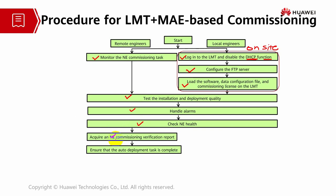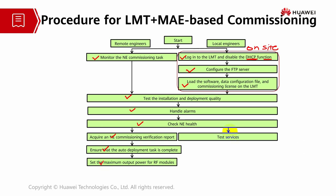The engineer needs to ensure the auto deployment task is completed and also apply maximum output power settings for the RF modules so that services are not impacted. Once commissioning is complete and the remote engineer has finished all verification — including the RF module settings and auto deployment — the local engineer performs the service test, checking all services related to the commissioning. Once they confirm services are normal with no interruption, they confirm with the remote engineer, who then sets the NE mode back to normal, which is related to the maintenance mode.